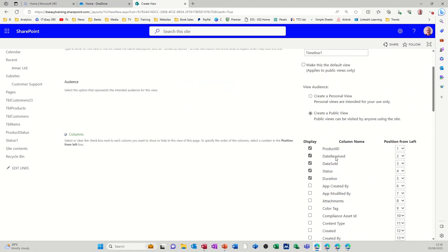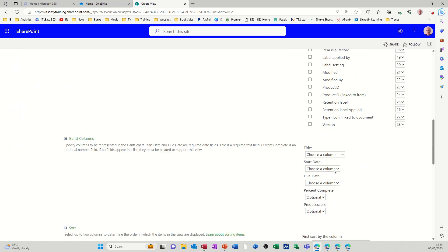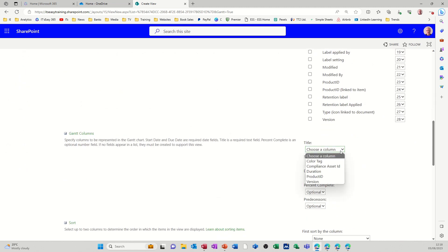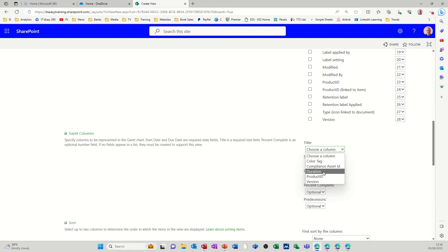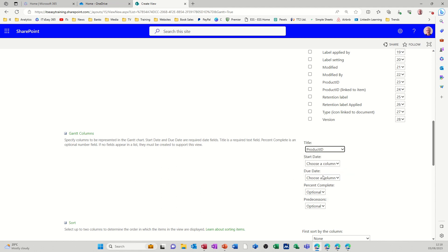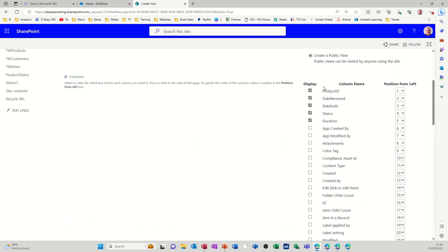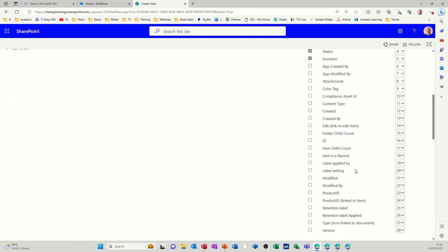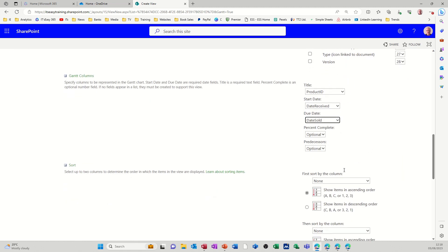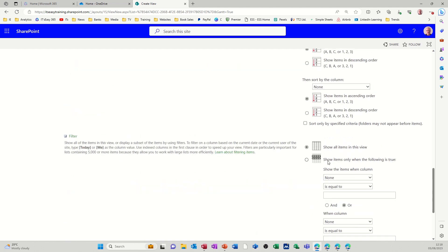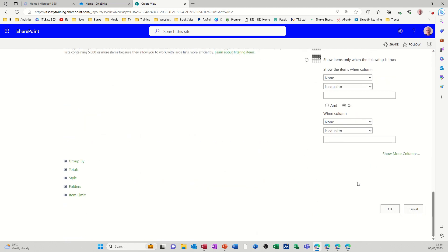So down the bottom, I've got all the fields ticked there, but down the bottom you need to choose like whatever the title is going to be. So you've got product ID stuff there, so let's go for product ID. Choose a start column, so it's going to be date received. And then the due date is going to be date sold. That's just an example. Obviously you probably need a few more items. I haven't got product description in there, it's just the ID field. And then you've got options to sort it and different layout options.